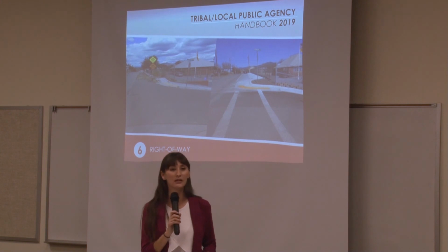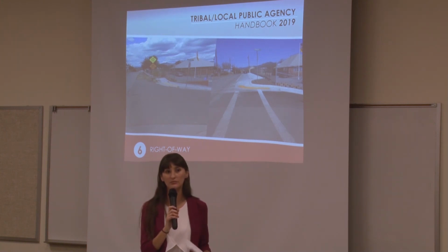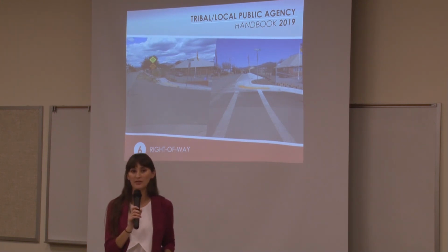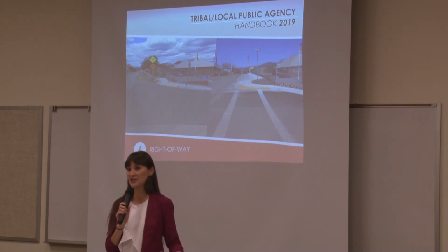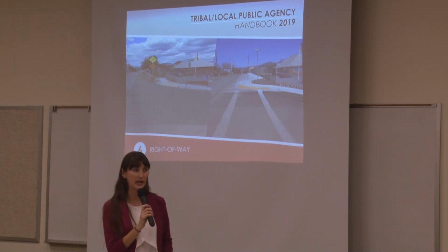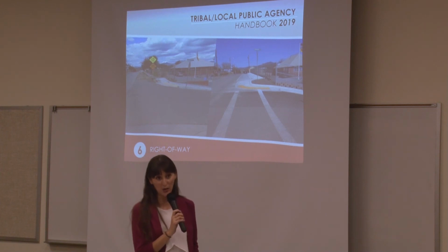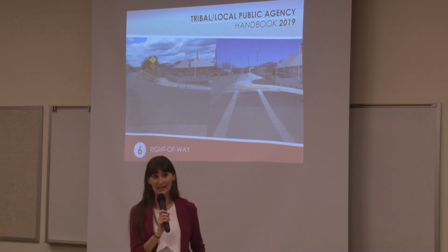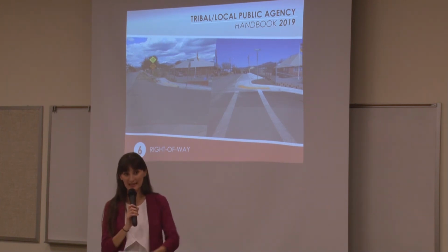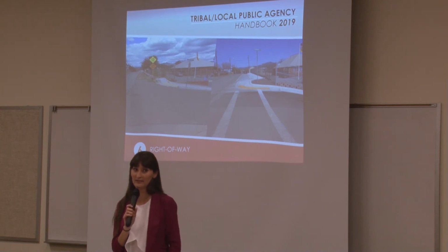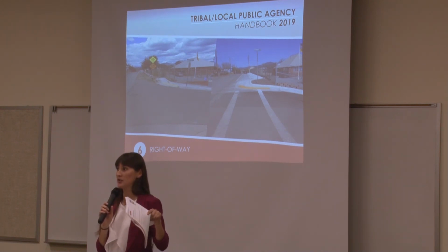If it's 50 years and older, does it make it historic and it's documented as historic? So the question is, just because it's 50 years and older, does it automatically make it historic? The answer to that is no. It has to be documented by the State Historic Preservation Office that it is historic. So that's a trick question.